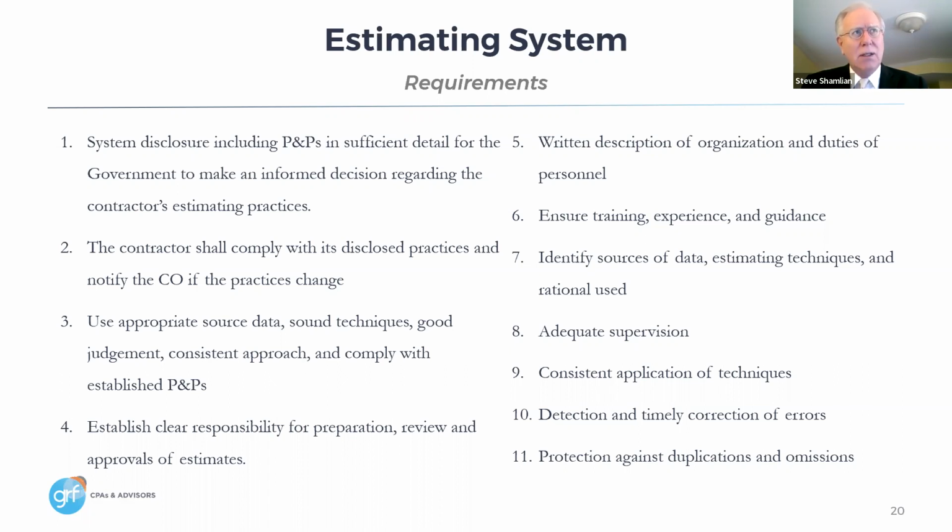There is a case that's really worthwhile to read, the Daewoo construction case, where the contractor made an estimate to get an equitable adjustment. And they not only duplicated their estimates, they tripled and quadrupled their estimates. And this came out in court, and the judge was unsympathetic. So next slide, please.